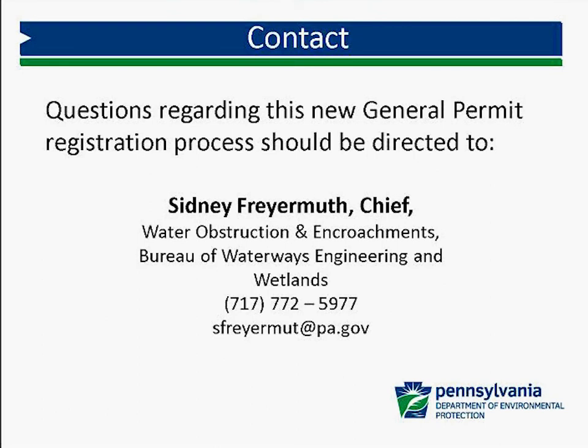It can be used as a tool for you as a client to determine what your impacts are and what associated fees need to be submitted with that permit submission. It can also be used by the DEP or County Conservation District reviewer to determine whether the fees have been adequately submitted, to determine whether it meets the completeness/eligibility requirement for the registration.